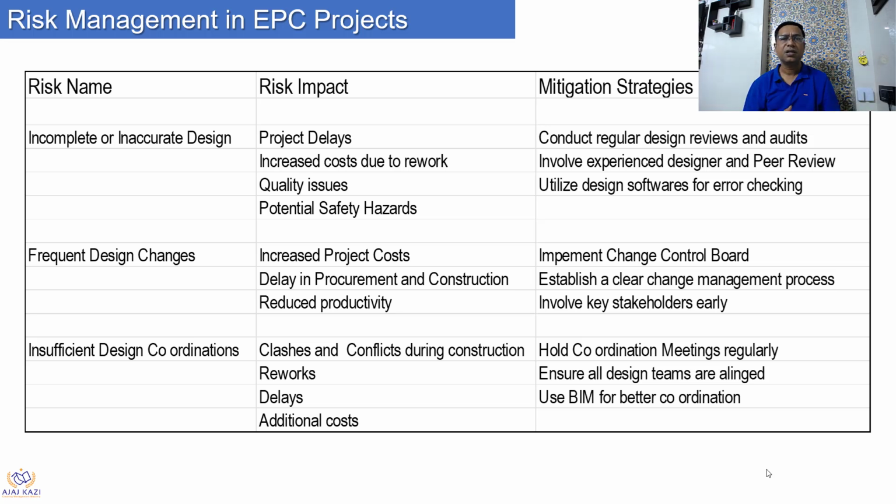The second aspect of design is frequent design changes, and this is there in many projects, right? The impact is increased project cost. There is delay in procurement, because when changes keep happening, it also impacts procurement delivery, and obviously construction gets delayed. Because of this, there is a reduction in productivity. These are the impacts on the project.